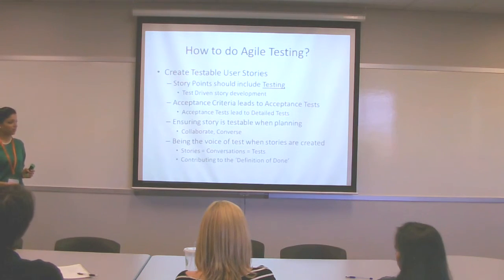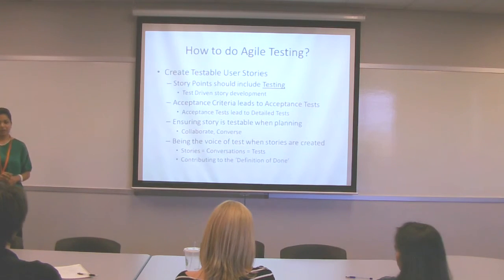And mostly the feedback on how many story points it would be came from developers. It needs to come from testers as well. Testers need to say, it may take you 1 day to develop, but this is a lot of testing effort for me because this touches 6 areas. So I'll have to make sure that all those 6 areas are working fine along with this new feature.